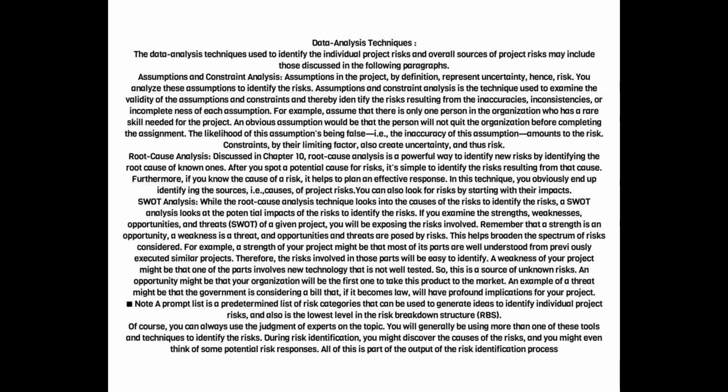SWOT analysis. While the root cause analysis technique looks into the causes of the risks to identify the risks, a SWOT analysis looks at the potential impacts of the risks to identify the risks. If you examine the strengths, weaknesses, opportunities, and threats, SWOT, of a given project, you will be exposing the risks involved. Remember that a strength is an opportunity, a weakness is a threat, and opportunities and threats are posed by risks. This helps broaden the spectrum of risks considered.